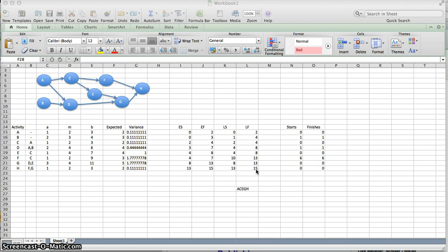But there is still a probability that it will take longer. All we can say is 50-50. But we can calculate then if somebody were to say, well, what would be the probability that you have it done in 16 weeks if we had an additional week, or 17 weeks if we had 2 additional weeks? Or we could even calculate the probability of getting it done early. Let's say they wanted to know the probability of having it done in 14 weeks instead of 15 weeks. You know that's going to be less than 50% because of your normal distribution.